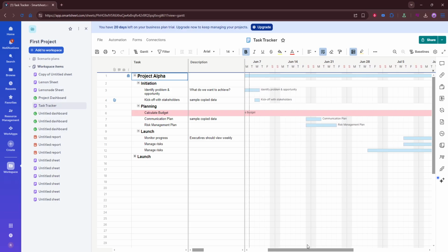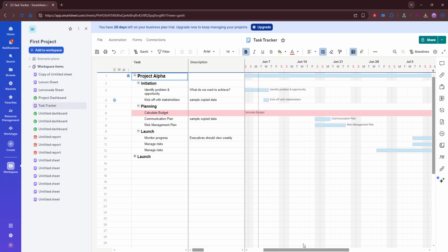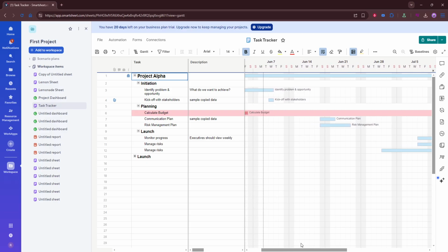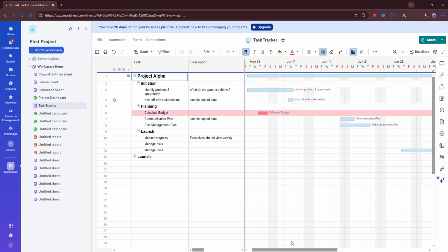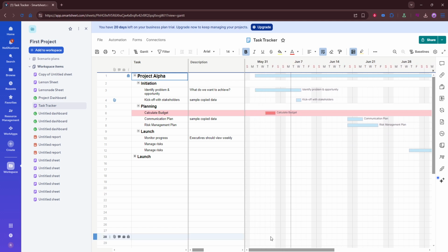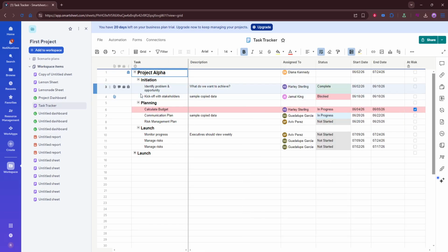If some tasks are connected, add dependencies and predecessors. This tells Smartsheet that one task relies on another task being completed first. Setting this up is useful because it helps maintain a realistic schedule. If one date changes, connected tasks can adjust more intelligently, which reduces manual updates and helps prevent planning mistakes.